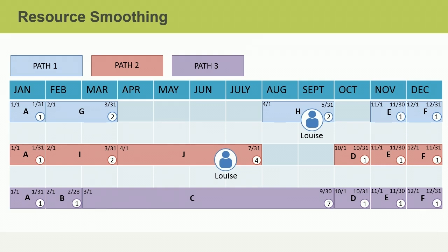This is very important for controlling the schedule. If we had decided to delay activity J instead, we would have used all of the available float on path 2, and as a result, we would have made it a critical activity with no more available float. That creates unnecessary risk to our schedule, so we probably wouldn't use resource smoothing with activity J in this situation.